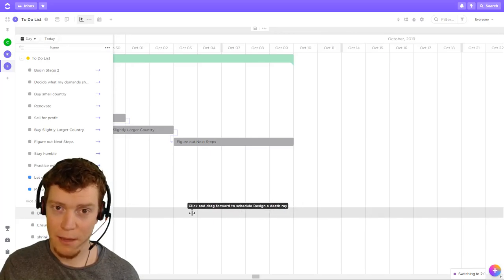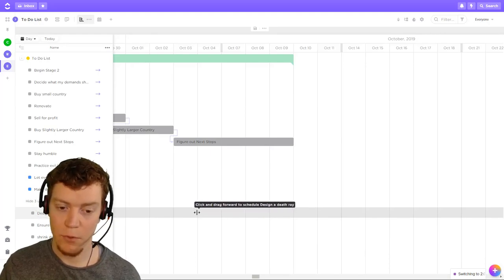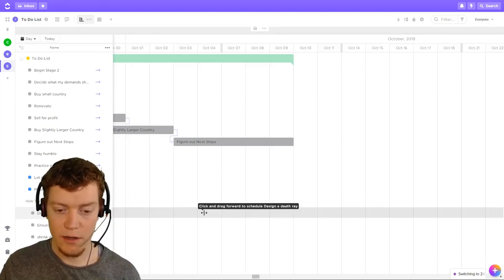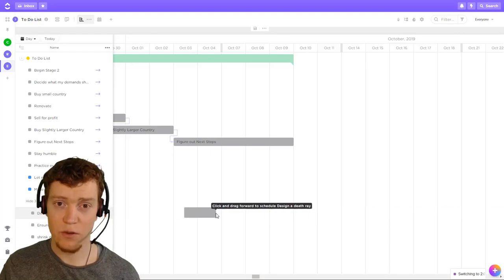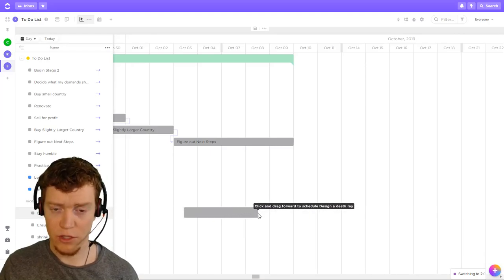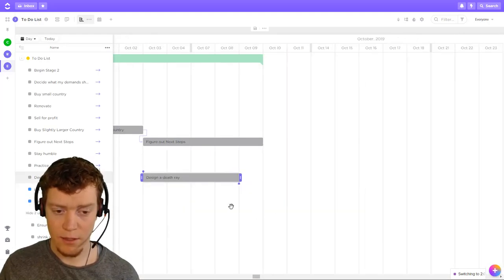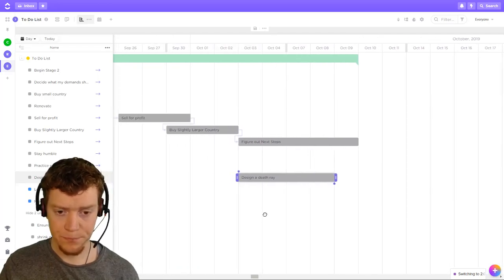Now you'll notice that nothing happened, but what it does have is this click and drag forward to schedule box. So now anywhere on here, we can decide when we want this task to start. I'll say kind of like midday on October 3rd, and then drag it to when we want it to end. So midday on October 8th. Let go, and then we'll put it in there for us.